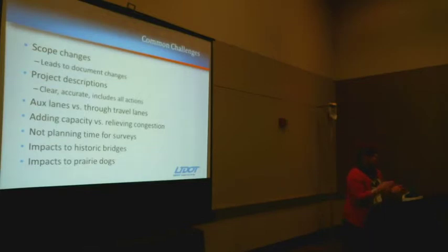If you're not sure, just ask your environmental manager, ask your project manager, go back through the project file, and make sure everybody's clear and you're all talking about the same things before you get too far into the environmental document. Because if you do need to do a documented CE, it's a lot easier to decide that up front, and we can do some things to not expedite the process, but make sure that it's not going to hold up your project. Whereas at the very end, if we find out it needs to be a documented CE, that's going to affect your advertising schedule and your construction schedule.